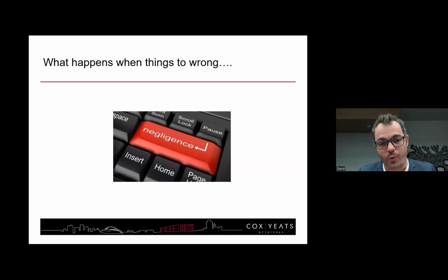If it is one of the big 4, and by big 4, I mean FIDIC, GCC, NEC3, NEC4, and JBCC. Alternatively, MBSA, PROXA, one of those subordinate contracts that subordinate through the JBCC. Those contracts will have terms on liability, but remember, those terms can be amended through adjustments made in the appointment letters, adjustments made in the contract data, if it's a tender appointment.